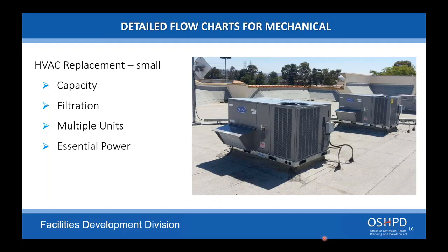Now, you're replacing one unit and saying, well, this is my project. I don't have to do anything downstream. There might be some minor adjustments to the ductwork underneath to connect it. That's fine. Once we did this and told people, well, you can do this as this is your scope of project. Nothing else is required. You can swap these out.